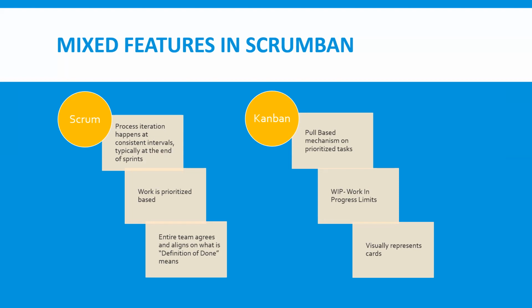If you set the limit, say one story for each of the 5 team members is sufficient to work simultaneously, then it's fine. If somebody wants to take another story which might be dependent on their story, then they can ask the higher manager, okay, can I take it? Or they can take it.